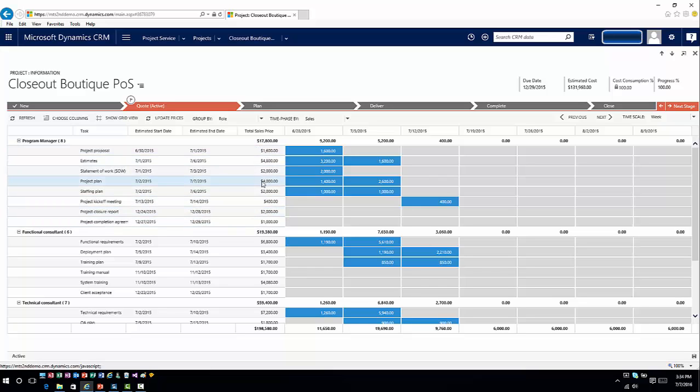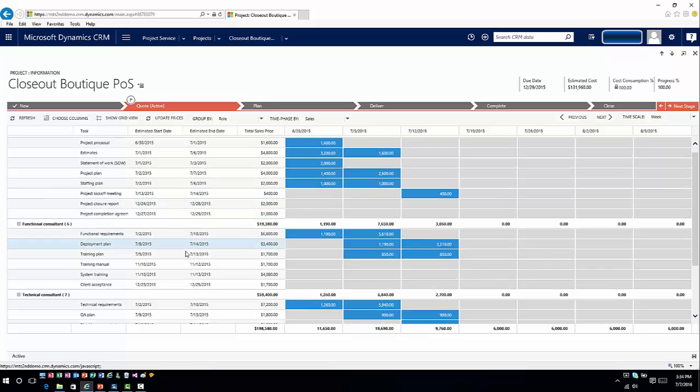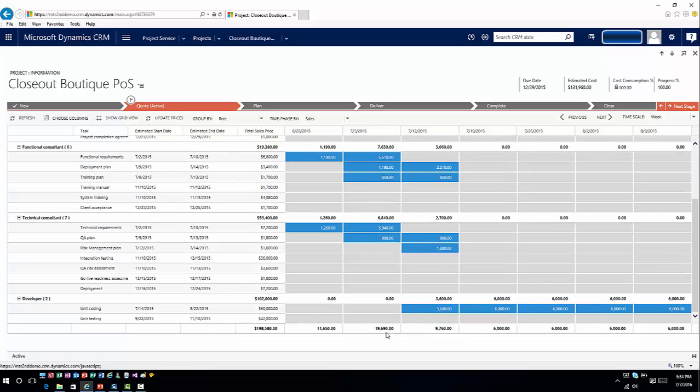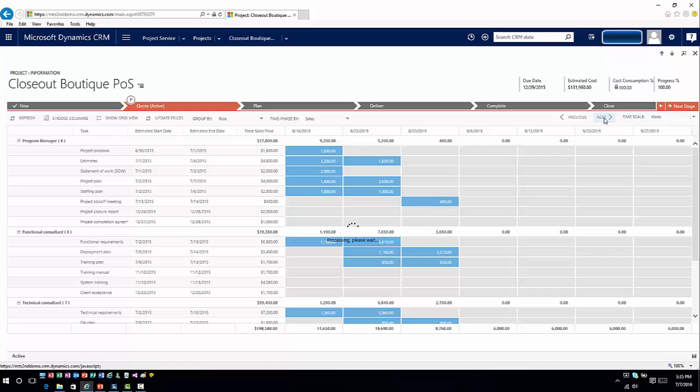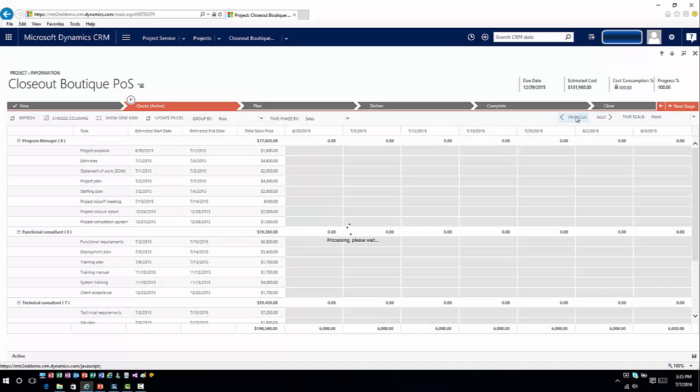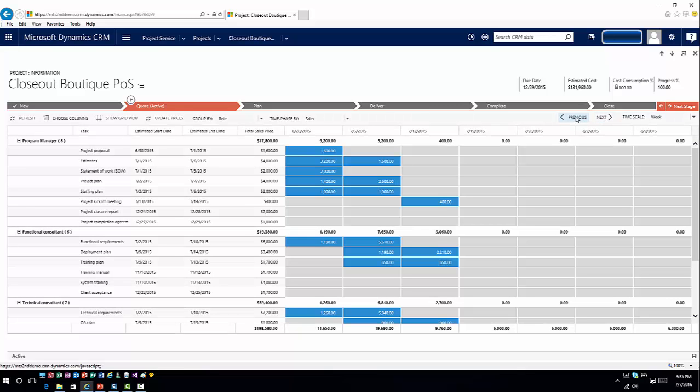I can also see total sales prices based upon those, because for each one of these roles I can now define costs and items associated with that. I can do that for each role that is going to come into this, based upon the timeline that we've specified for each one. This gives me the capability to look at this from a weekly structure standpoint. I can come in from each specific week of the application and see where these items fit in and what particular items we want to work through.